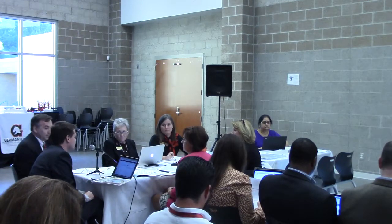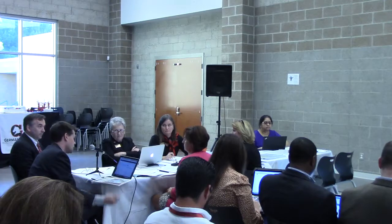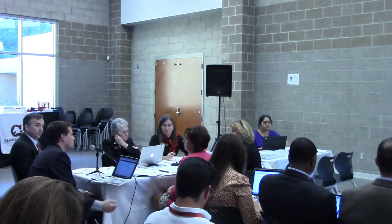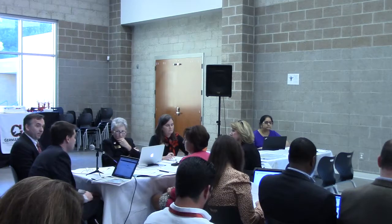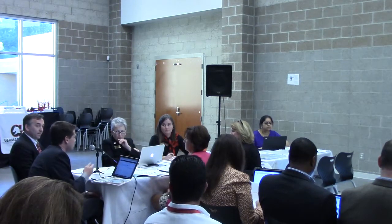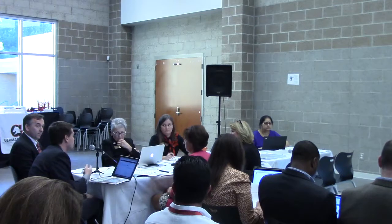After that, assuming the school board approved, we would need to start having design meetings just like we did with Riverdale and just like we're doing now with the elementary school, and put the right people on that committee to make sure design decisions are being made. Go ahead and bring Fleming into the fold. All the while they're out chasing dollars and fundraising, trying to make this a reality, and they really need to go through this first step, the proposal, in order to do that. The school board does need to be aware that you are at risk for $22,500.